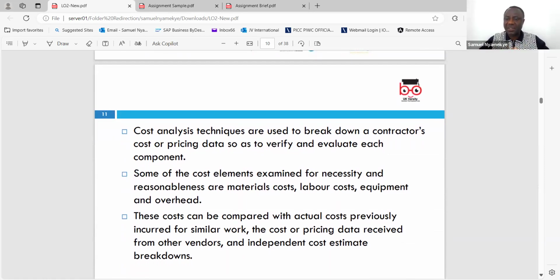Materials will cost, okay, you are saying that labor is going to cost that, okay. How many hours of work time do you need? Okay. And you are saying transport will cost this. Okay. So if we put all three together, it looks like your cost is going to be this. So why are you charging me this? Does it mean that you are doing 20% on your cost? Why don't you do 15? So you have to look at that with them.